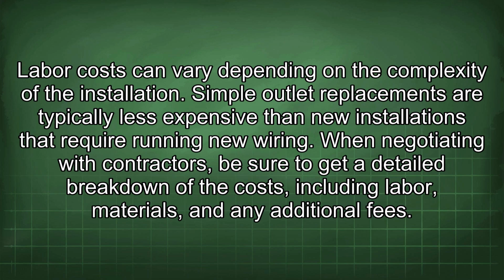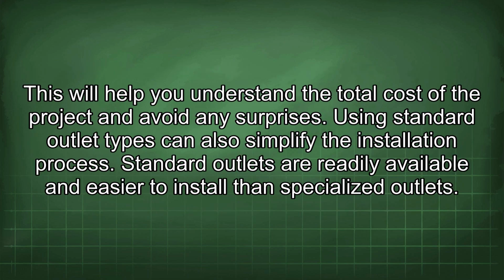When negotiating with contractors, be sure to get a detailed breakdown of the costs, including labor, materials, and any additional fees. This will help you understand the total cost of the project and avoid any surprises. Using standard outlet types can also simplify the installation process. Standard outlets are readily available and easier to install than specialized outlets.